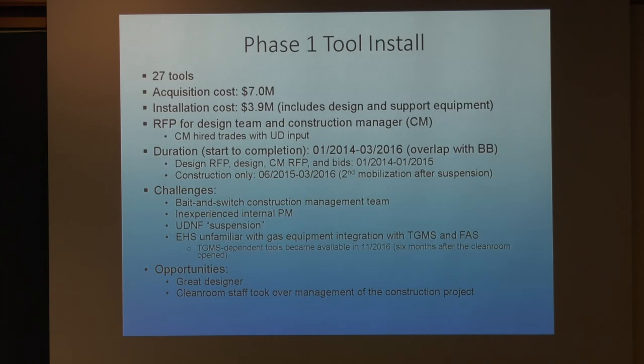The next project was the first phase one tool install, 27 tools, $7 million, about $4 million to install. So the approach we have at the University of Delaware is we hire somebody to give us drawings for the tool install. We hire a construction manager. The construction manager hires trades and they do the work for us. The only thing we do is supervise.